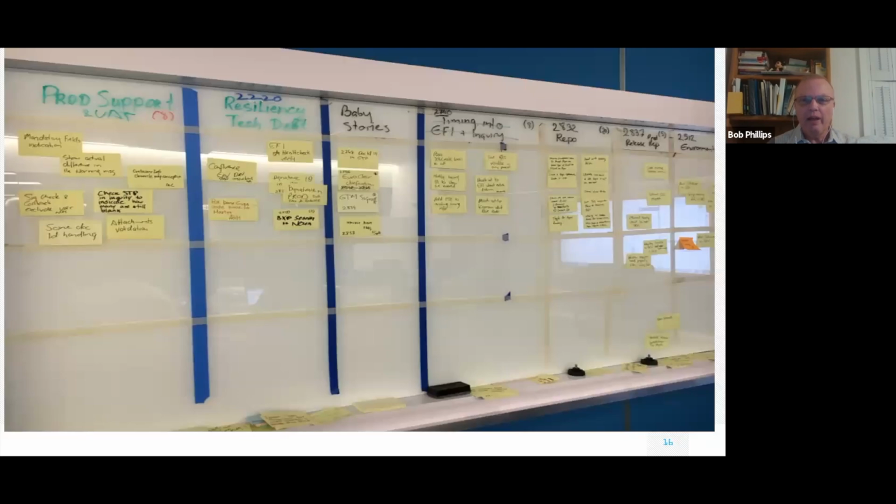And then this is a way, I really love Kanban boards. This is a program that I was running at BNY Mellon. And what this is showing is a Kanban board where each column represents a PBI, a product backlog item. And remember that when we made that breakfast, the subtasks are these Post-it notes. And this is when the dev team says, in order to do this work, these are the things that I need to complete. And as they do the work, these 3 rows here represent not started, in progress, and done. And this is a real live board. It wasn't really set up for this picture or anything.